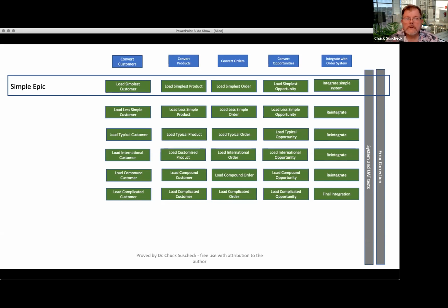Good example. Another example here too: one company I worked with who did this was making logistics software for small airplanes, and they were trying to do it on an iPad. Their first iteration was, we're going to get one Cessna going to one location, carrying one passenger, and it's less than 100 miles or something like that. So they didn't have to worry about a lot of things, but they were able to make the logistics of when they landed, how much fuel to put on, how it was going to fly, and whatever other things they did.